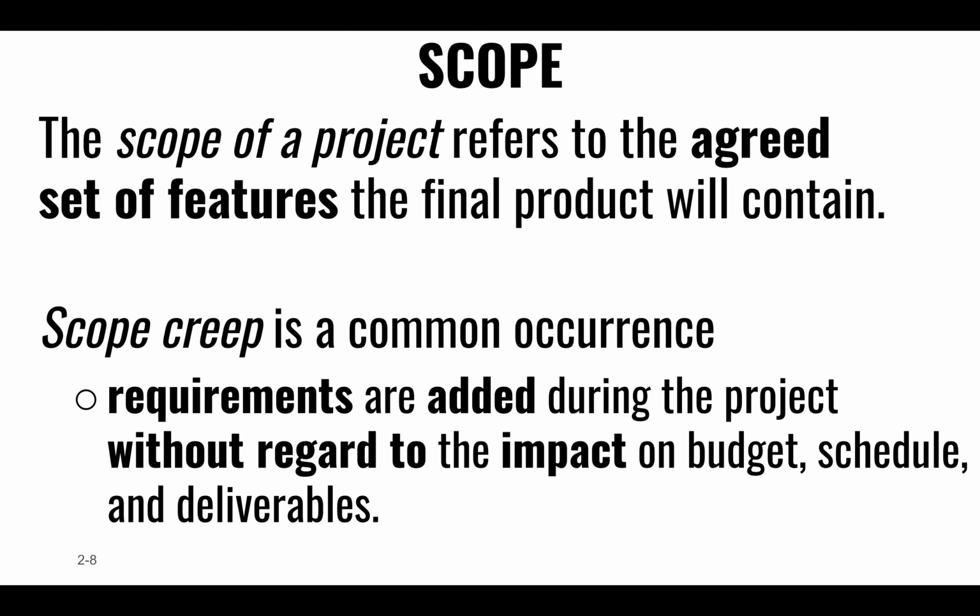So everybody in the organization needs to understand that this is negotiable, right? You can either give me a fixed amount of scope to work on, and then we can decide on when to deliver it, or you can give me a fixed amount of time, and then we can decide what the scope is, right? But you can't fix both. So it needs to be negotiable. So scope, and there's a bad word here, scope creep, is the fact that the scope tends to just increase over time, and we need to have processes around that.